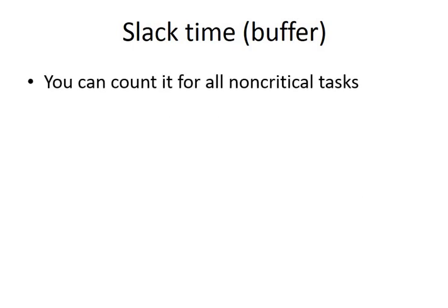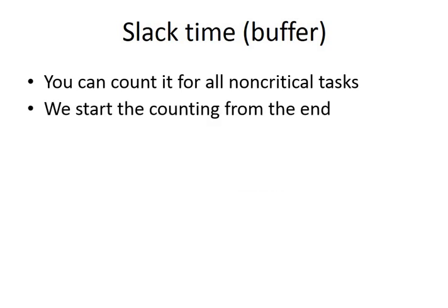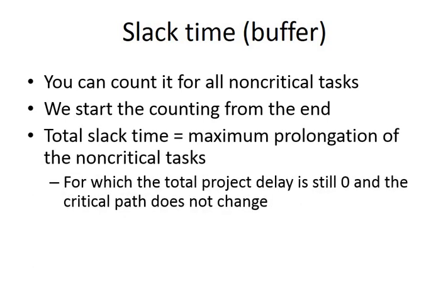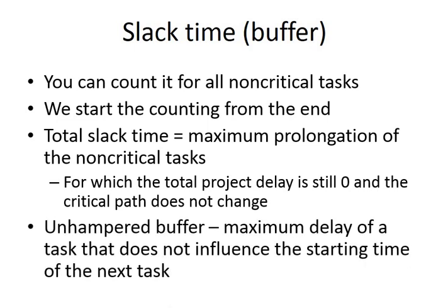Some phrases that we should know and understand are the slack time, or time buffer, which appears in non-critical tasks. We can calculate them. This is the maximum prolongation of the non-critical tasks for which the project is still no longer than before.